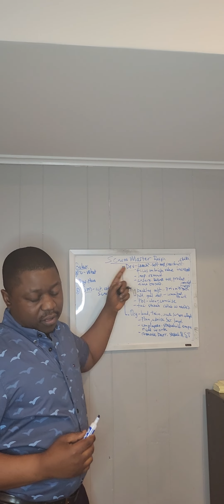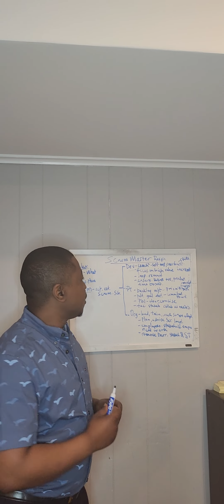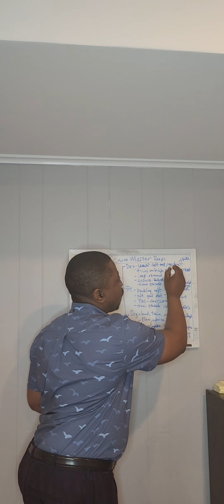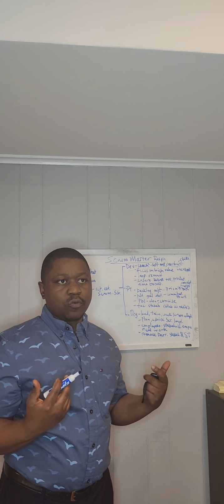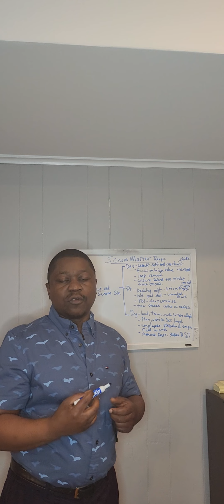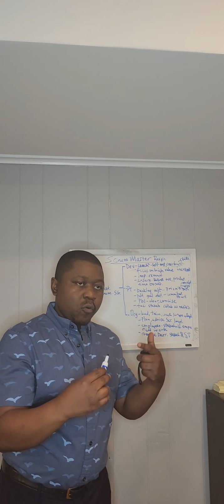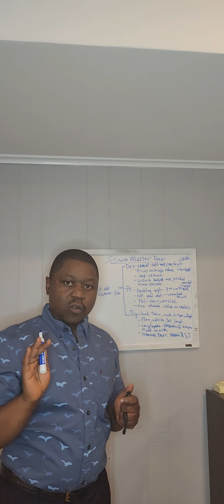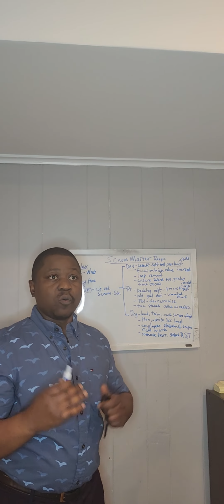So talking about the Scrum Master's responsibility to the dev team, he is responsible for coaching the dev team on self-management and cross-functionality, right? So the dev team is expected to decide how they are going to go about transforming those requirements into usable code, right? They decide who would work on what, and nobody has to come and micromanage them, and they come up with their strategy on who has to work on which item.